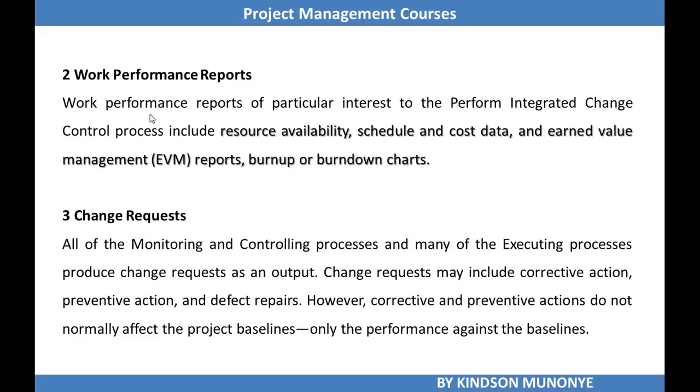We also need the work performance reports as input to Perform Integrated Change Control. The work performance reports of particular interest to this process include resource availability, schedule and cost data, earned value measurement reports, and burnup or burndown charts.